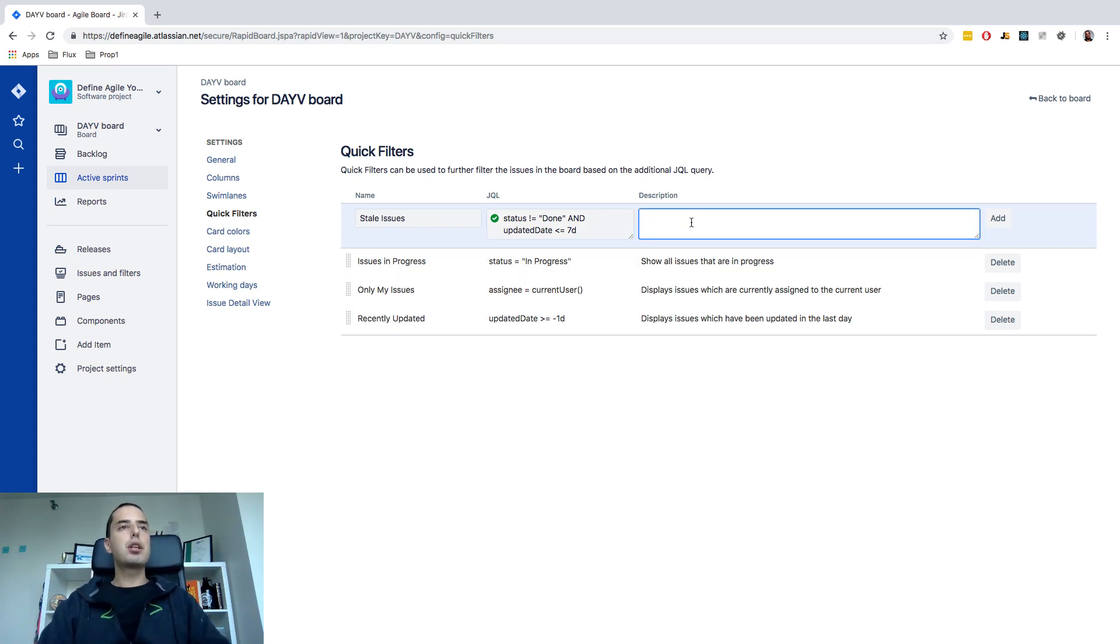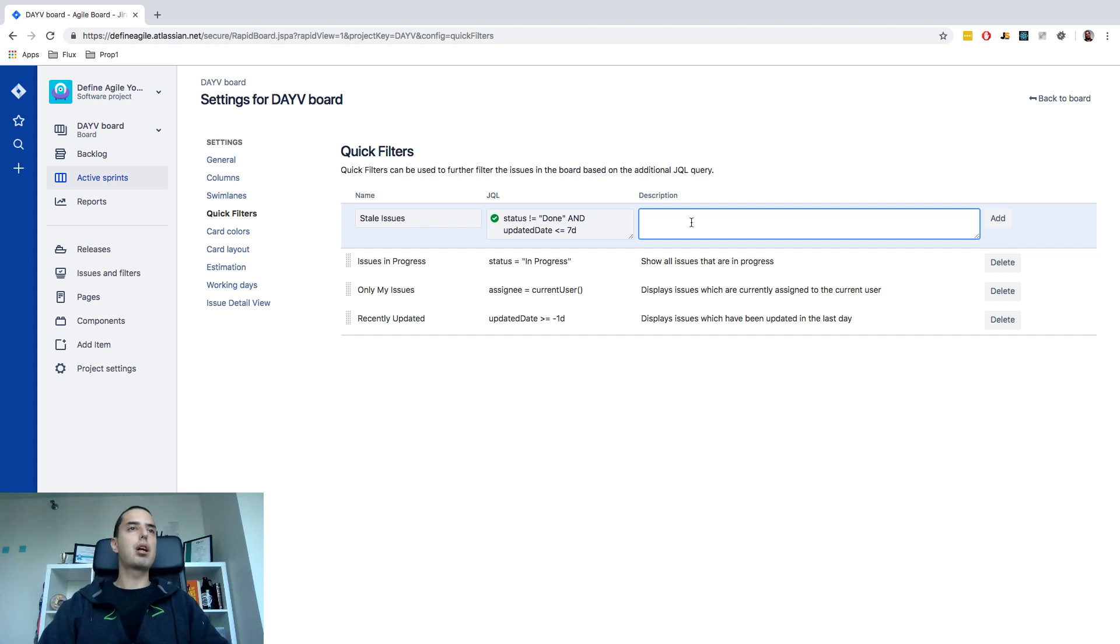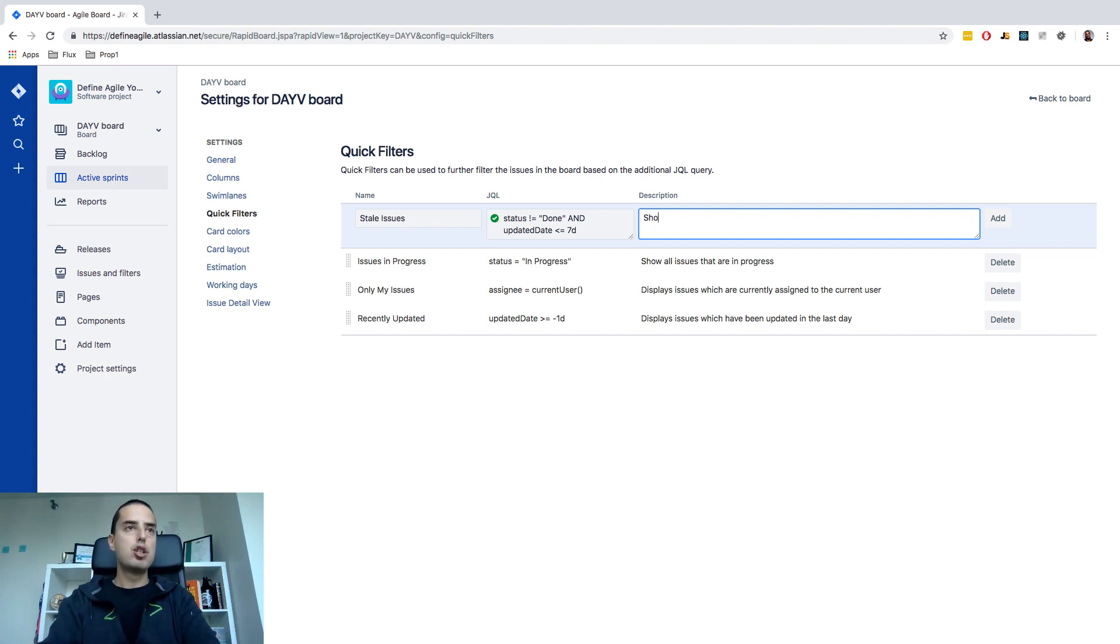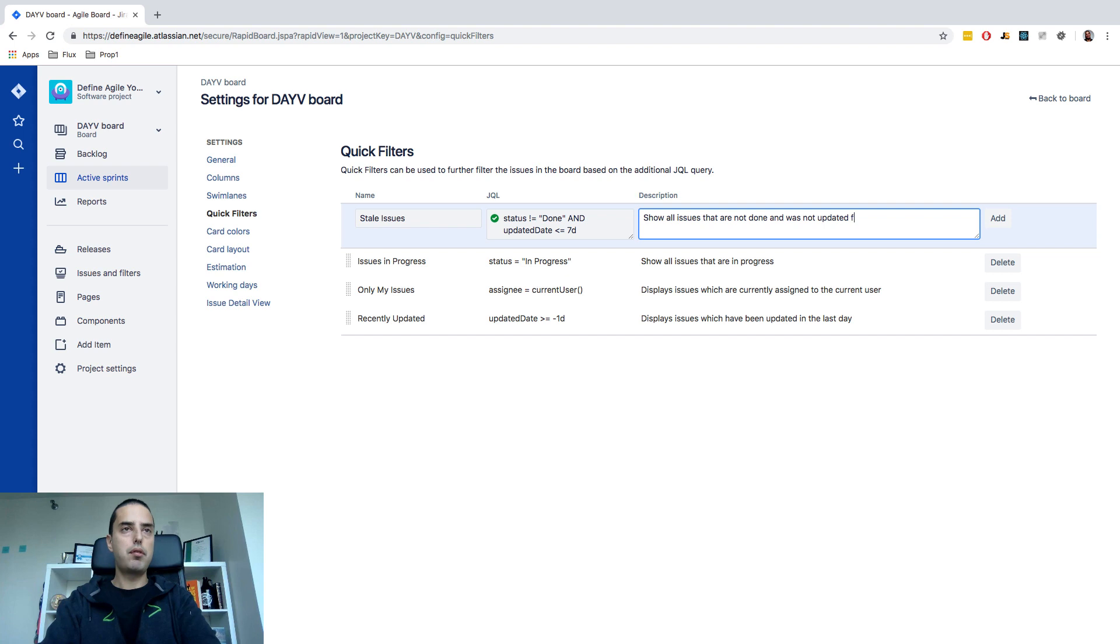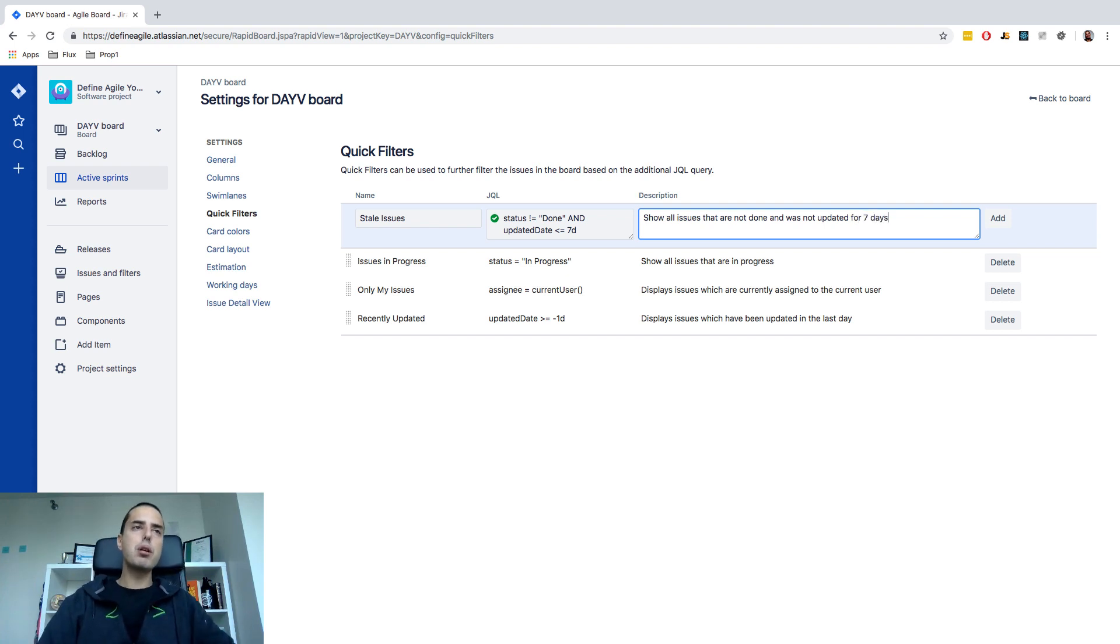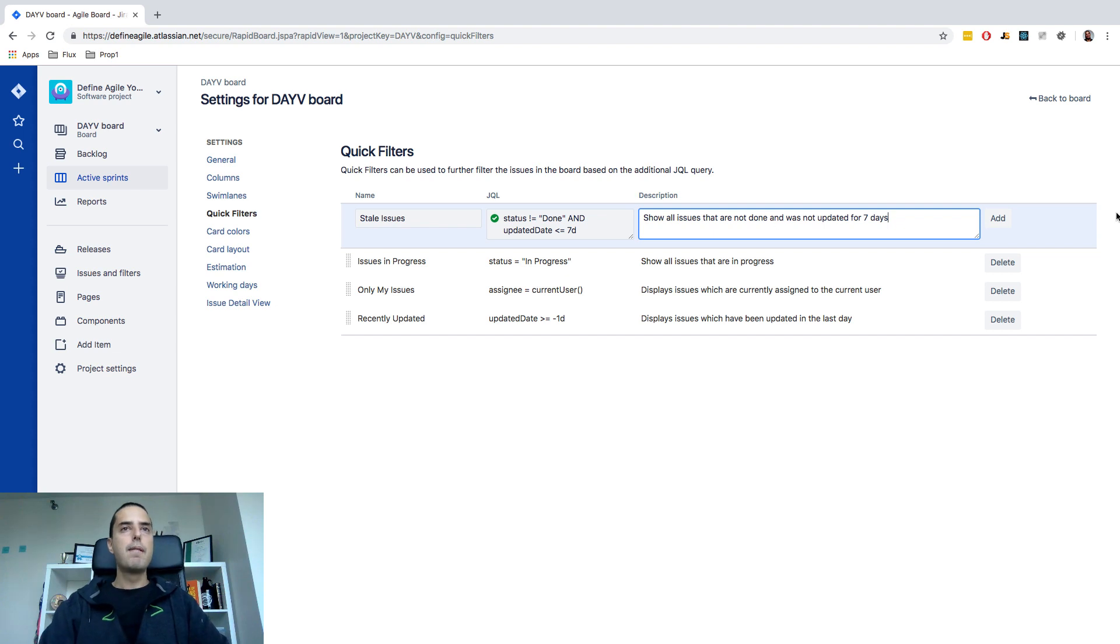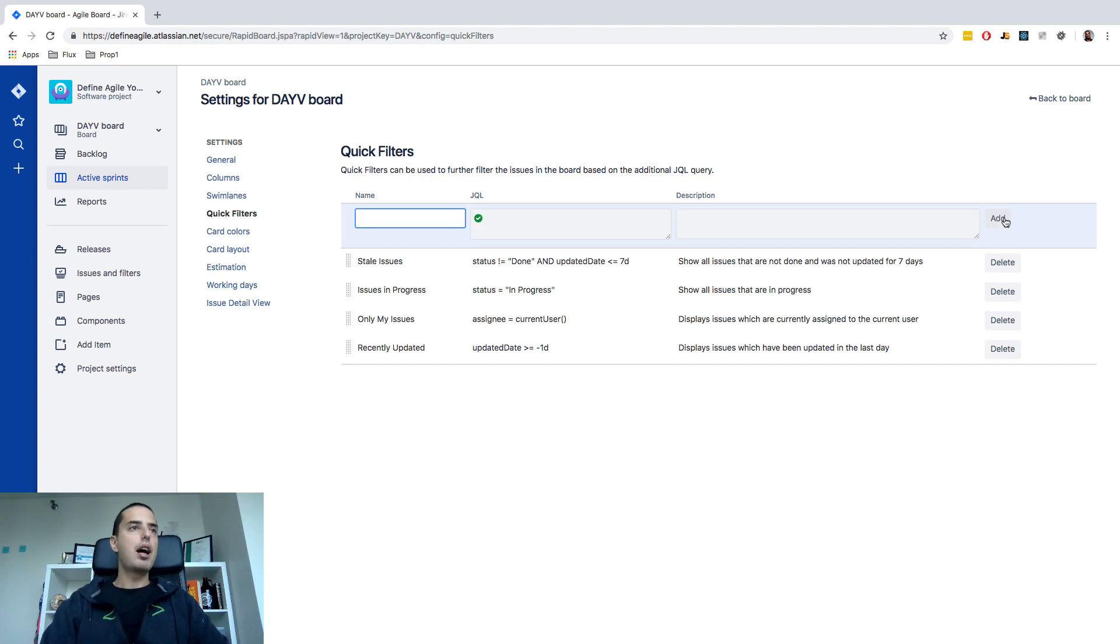So description. I usually like to put description mostly for other people who are looking at those. So you can say show all issues that are not done and was not updated for seven days. Also for you when you look back it's cool to have those notes. Then click add and your new filter appears. Let's check it out.